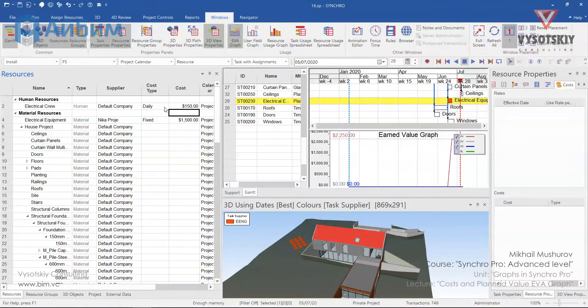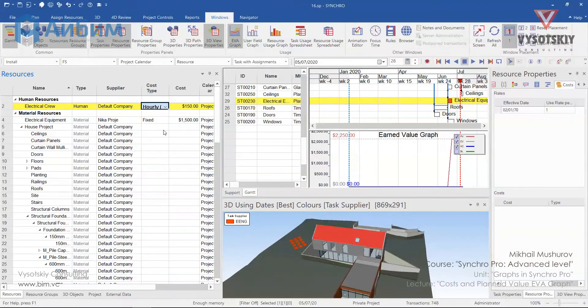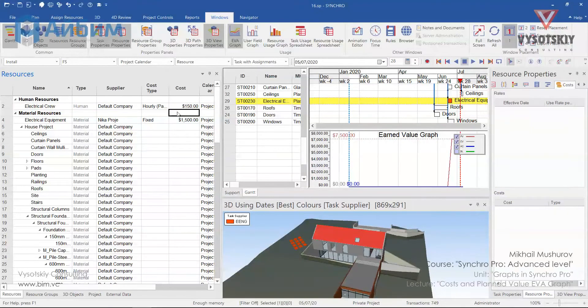What if we change cost type of the electrical crew from daily to hourly? The cost will increase.